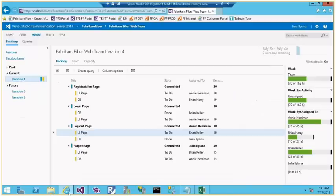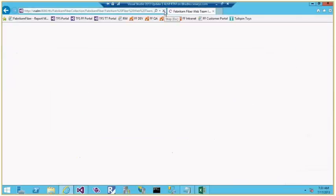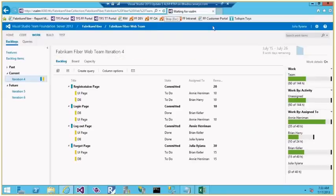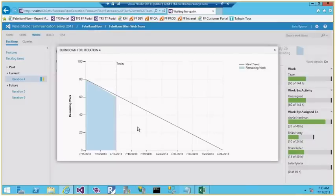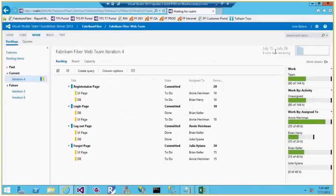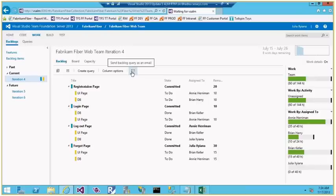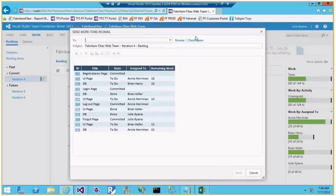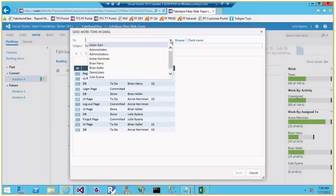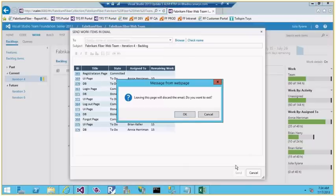After more work is done and the page is refreshed, the burn down reduces further. The burn down report shows the iteration start and end date, today's status, and the ideal trend line. I can also email this report to stakeholders — clicking the email icon lets me type email addresses or browse team members, choose columns, and send.